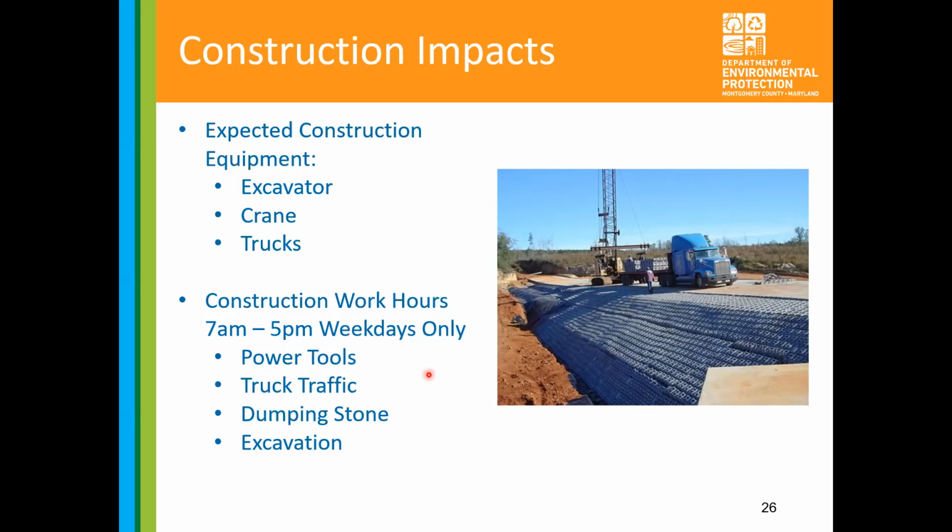And the construction work hours are 7 a.m. to 5 p.m. on weekdays only. But you can expect some noise during those hours from the power tools and the truck traffic and dumping of stone and excavation and other activities.